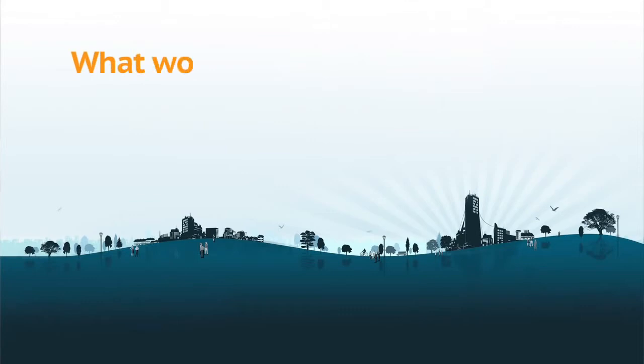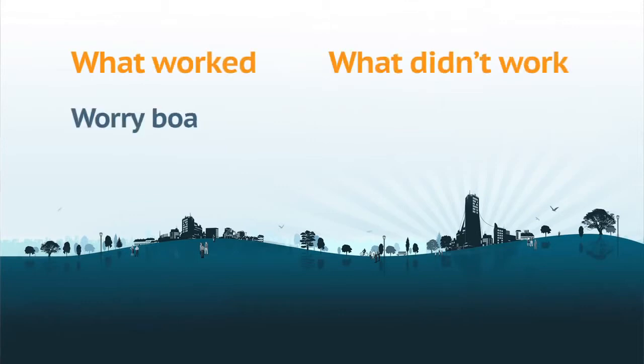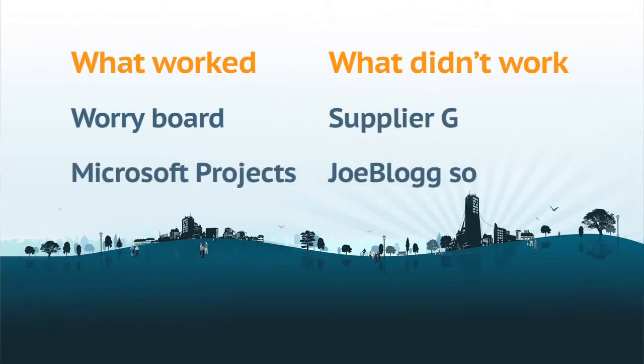Remember, there's no perfect way of running a project, but having processes in place that help you highlight best practice, as well as what not to do, will ensure that your next project will always be more efficiently run than the last. After any project, ensure that you have a review. Figure out what worked, what didn't, and collate any ideas the team have going forward that will help you approach the next project in a more efficient way.